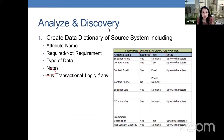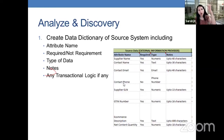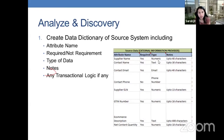In the analyze and discovery phase, we create a data dictionary of the source system. A data dictionary is a listing of all of your data attributes — an attribute name may be contact name or contact email. Any data field that is in the database should be in a data dictionary. If you're working on a data migration project, your first step is to create a data dictionary that lists all of the fields in the database, whether those fields are required or not, and the type of data — whether it's numeric, text, email, phone number, or any other transactional logic.